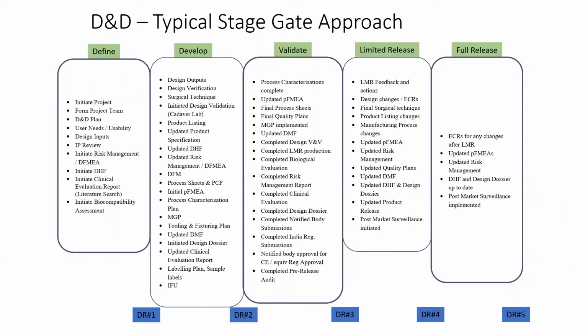And the process typically would also define a design review five, which is 6 to 9 months after commercial launch, with market feedback at the end of that period, making sure that full market release has not thrown up unexpected surprises and the device everywhere is functioning as per expectation.